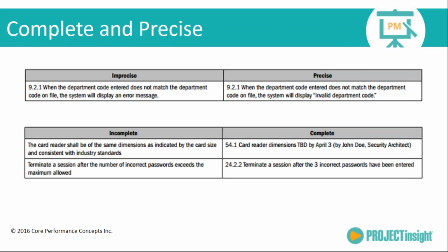Complete versus incomplete is a little bit different. And if you look at the example here, it says the card reader shall be of the same dimensions as indicated by the card size and consistent with industry standards. Well, what are they? What are those dimensions? What is that card size? What are the industry standards?